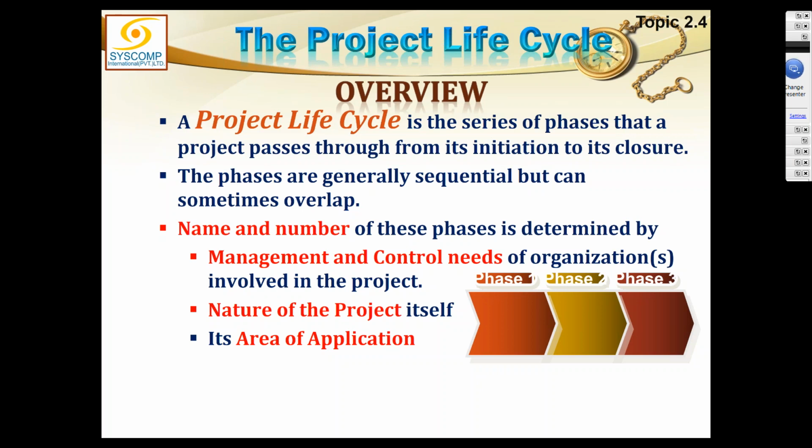So what will happen is, you have almost completed phase 2 and the second story is also almost completed, and you do not have the approval for phase 1, the first story. Ultimately someone comes in and rejects phase 1 and asks you to demolish the first story. So what will happen to the second story? You have taken a risk to achieve more speed. You have constructed a wonderful second story, which may not have any problems, but because the first story is going to fall, everything is going to fall along with it. So you have taken that much risk.